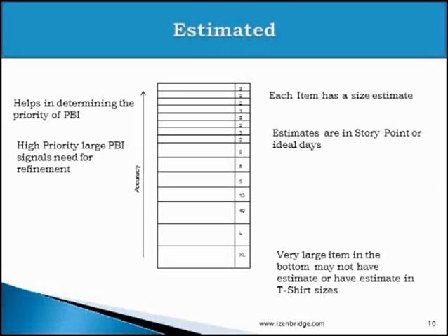There could be a few items which may get scheduled in a release at a later point of time. Items of such nature may not have sufficient detail where you can put a number against the requirement. In those cases, you may use t-shirt sizing, where you just give them a ranking of large, extra large, or medium, and keep them until you do an estimation at the responsible moment, when the prioritization of those items increases and they are expected to come into the upcoming release.